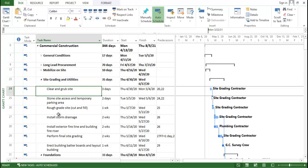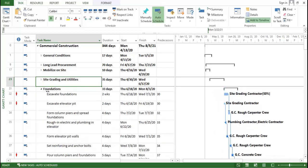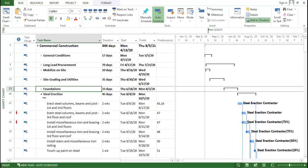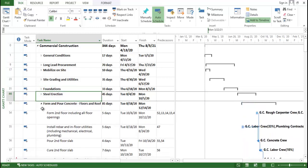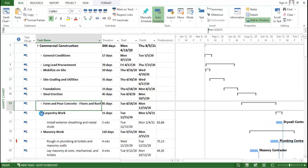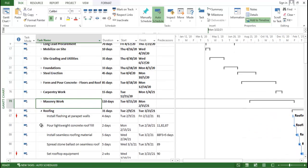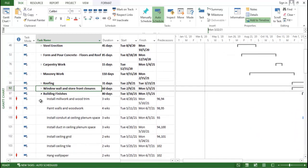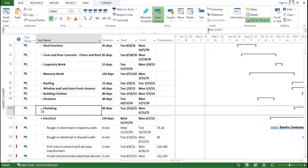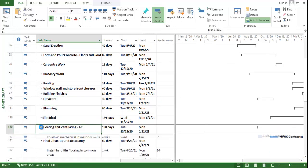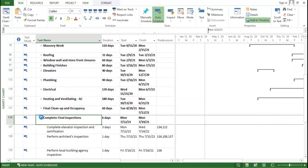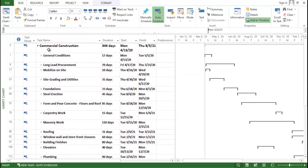Then we proceed with procuring and installing power, water services, site offices, and machinery on site. After that we do grading and utility work, then foundation, erection of steel, formwork, carpentry, masonry, roofing, window and wall work, building finishes, elevator, plumbing, electrical, heating and ventilation, final cleanup, and the final inspection.